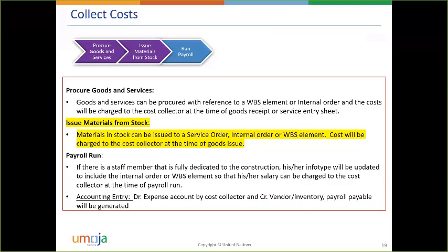It's a goods issue, and there is only one difference: instead of selecting a cost center, you will be selecting what is called a WBS element or an internal order. So in this VTC, since there are a lot of people, sometimes you are not willing to ask. But I need to understand if what I explain makes sense to you.